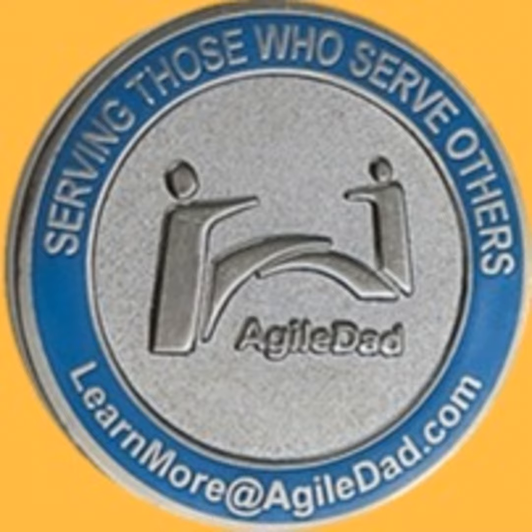But I think the big thing is you need to figure out how to combine these factors and triangulate. So while all five factors are important, I don't recommend combining them through a fancy formula. The value of a feature and its cost, the first and second factors, are the most important. Continue to prioritize, then, using the other three factors.